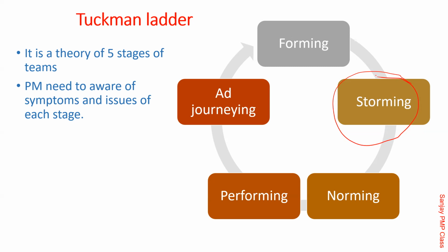Second thing, try to allow people to cross to the next stage as early as possible. Arrange some get-togethers, some interaction sessions, something of that nature which will make the team pass this stage very fast. That is the learning from this particular theory, and a very beautiful theory. I mean, even in travel, did you notice, when people are coming together for a travel which is for 15 days, ये सब होता है.